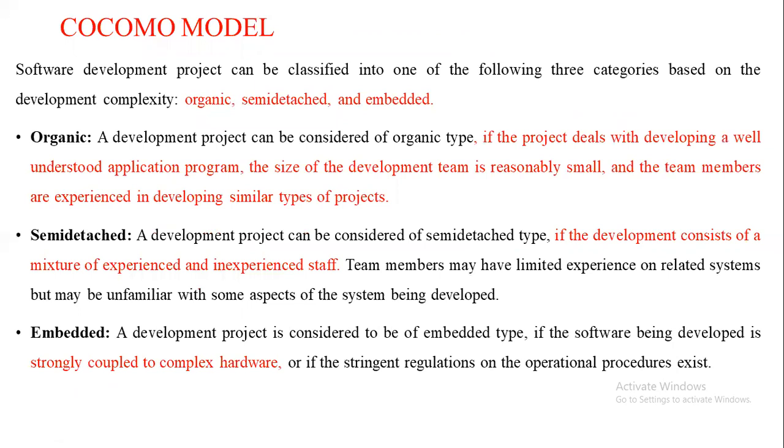COCOMO means Constructive Cost Estimation Model. As I told you, for software estimation we use the COCOMO model. This was developed by Boehm. Boehm categorized software development projects into three: organic, semi-detached, and embedded.